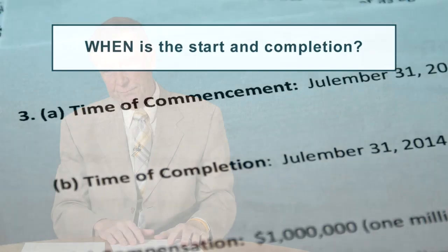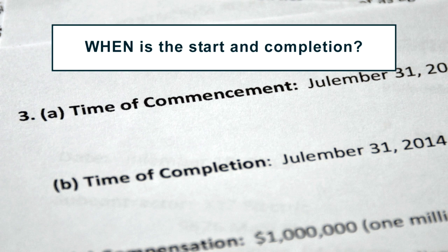So both the contract administrator for the general contractor, the contract administrator for the subcontractor, or the owner, the architect, construction manager, whoever it is, be sure you understand when this was done, when the contract was signed, and that no work was done prior to it because that work may not be covered by the terms of the contract. Once you're satisfied that your contract is in order in relation to the dates that they were signed and the dates that you appear on the job, there's a very important other start and completion date you have to be aware of.